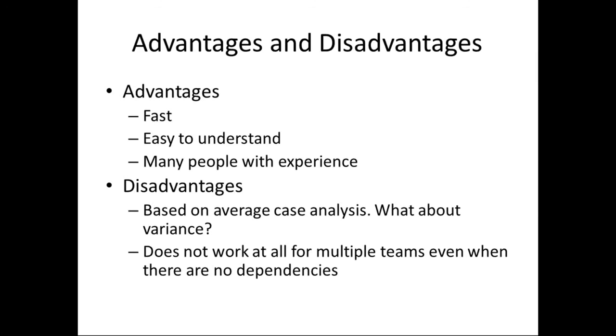One common mistake is that people take both teams and treat them independently. They say, this team is going to release in 10 sprints, this team is going to release in 11 sprints, so together they'll be done in 11 sprints. That's actually a pretty big mistake, and it will lead to very significant errors in understanding when the 2 teams are going to be able to release.